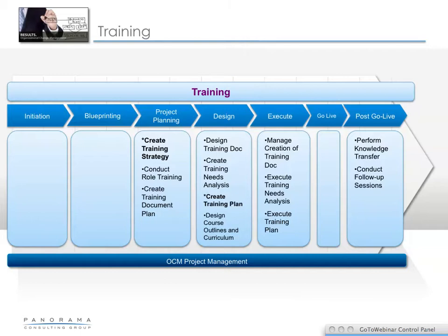During design, a lot is happening there. The needs assessment helps identify the number of users that need to be trained. Designing the courses helps us understand the length of any course, and you bump it up against how many users you have to train, and that then creates a training plan so that it helps you understand. Okay, we have 800 end users that need to be trained in a 4-week time period. Just exactly how are we going to accomplish that?